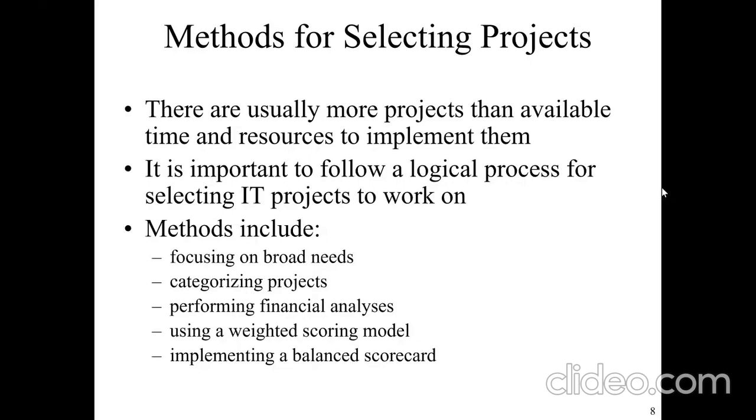So whatever system I'm going to buy, if I buy the system at X amount, and for 2 years I save the money for postage, printing, and all these things, I would recoup whatever investment I make in that system in the shortest possible time. So that is what he did in there. So we'll see some actual calculations and see how we do this calculation.